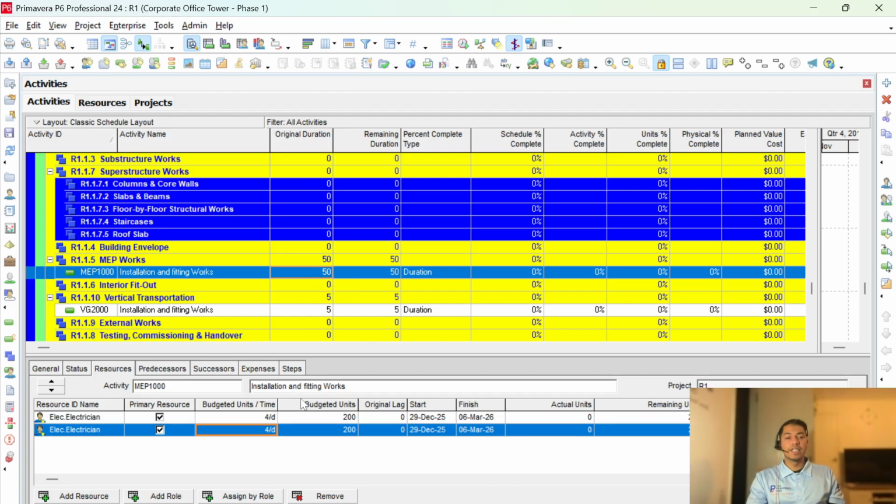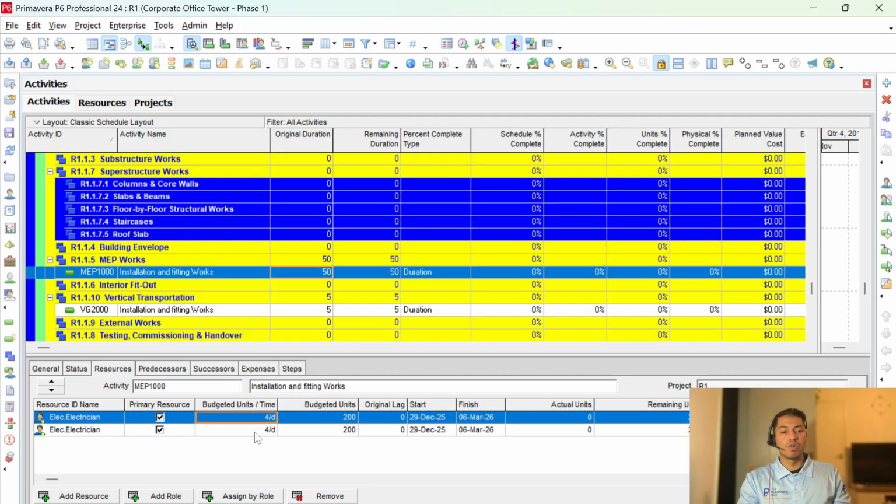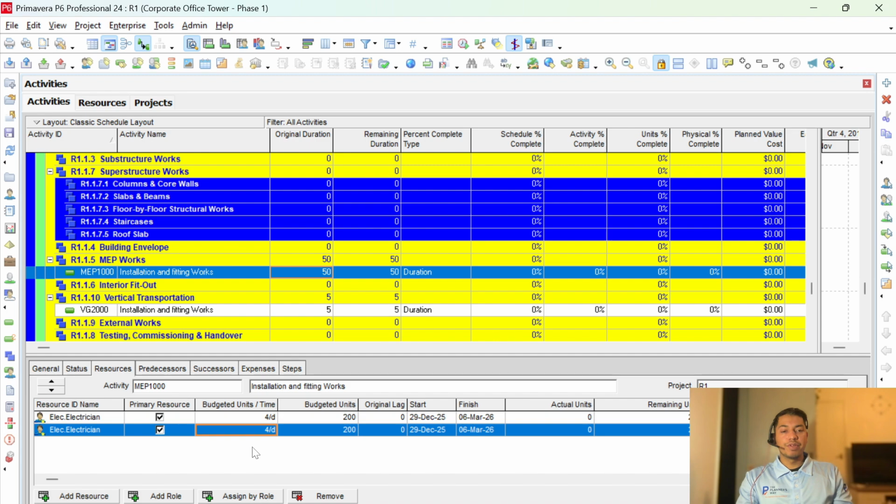We need another electrician to cover the 4 hours that the first electrician is not working. So it will represent our situation in the ideal scenario where we have the resources constant. If we require 5 resources and we only have 4, in that case the original duration may vary. We need to vary our original duration.